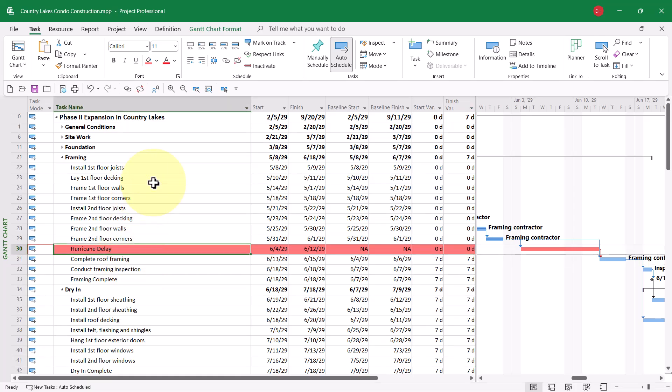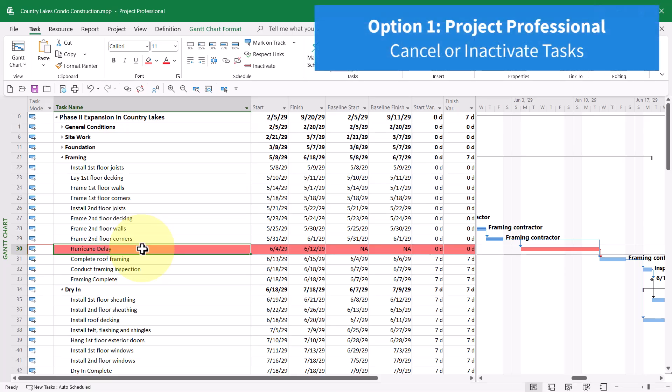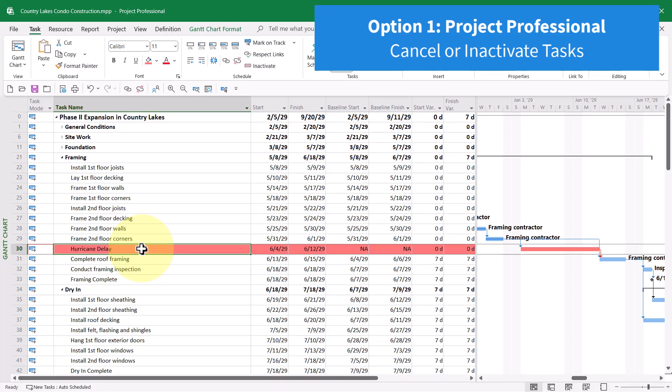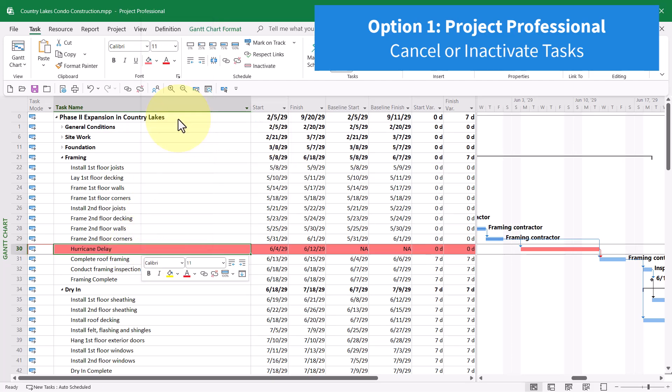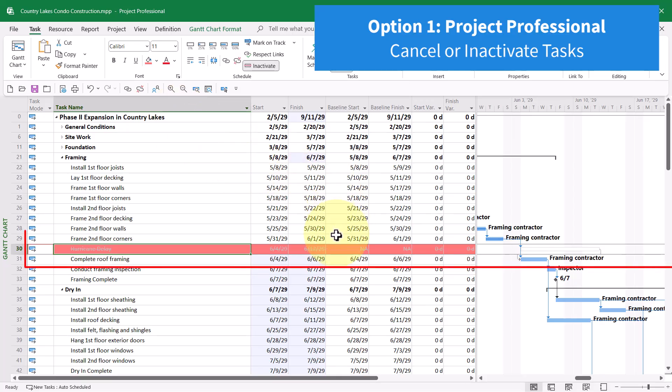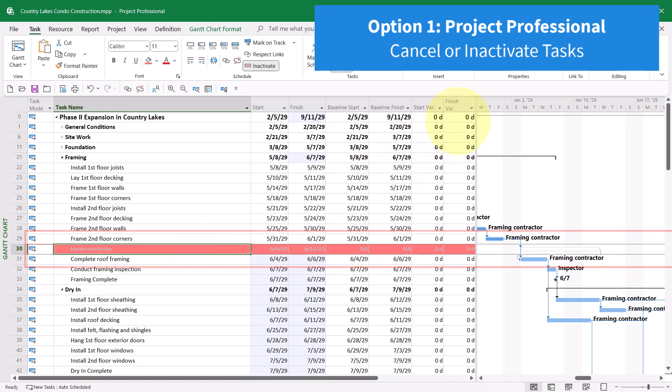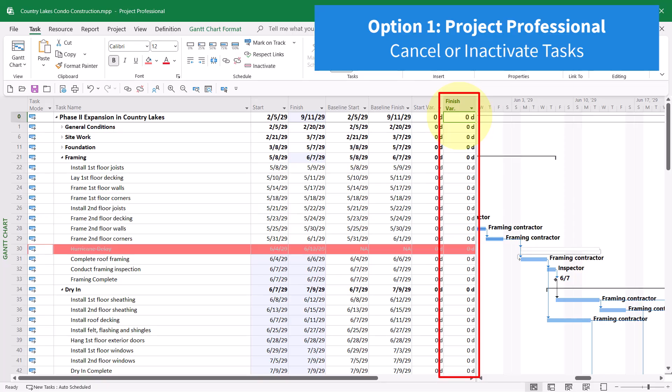How could we see the project and the Finish Variance if this hurricane delay task didn't exist at all? If you're a user of the professional version of Microsoft Project, you could temporarily cancel this task by selecting it, right-clicking on it, and then choosing the item on the shortcut menu called Inactivate Task. What this does is it cancels the task, but leaves it in the schedule. Notice that if this task disappeared, our Finish Variance would go back to 0 days.